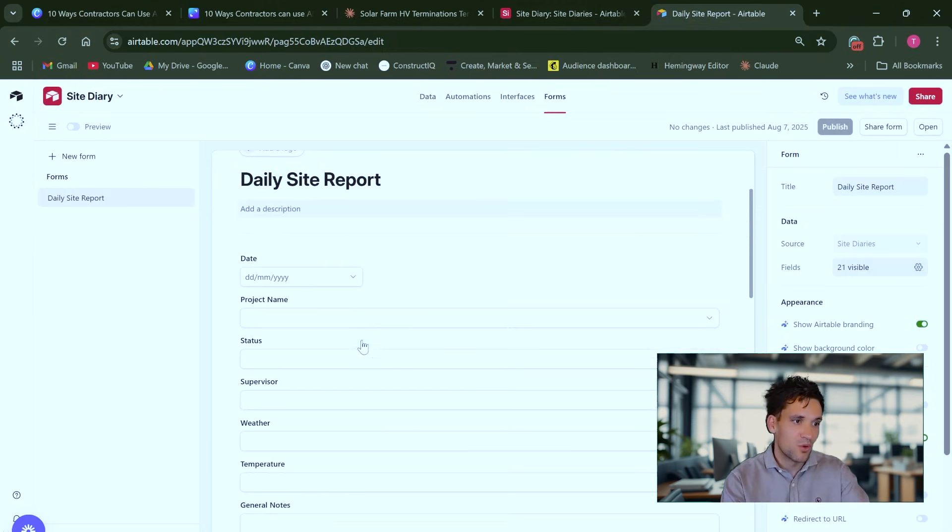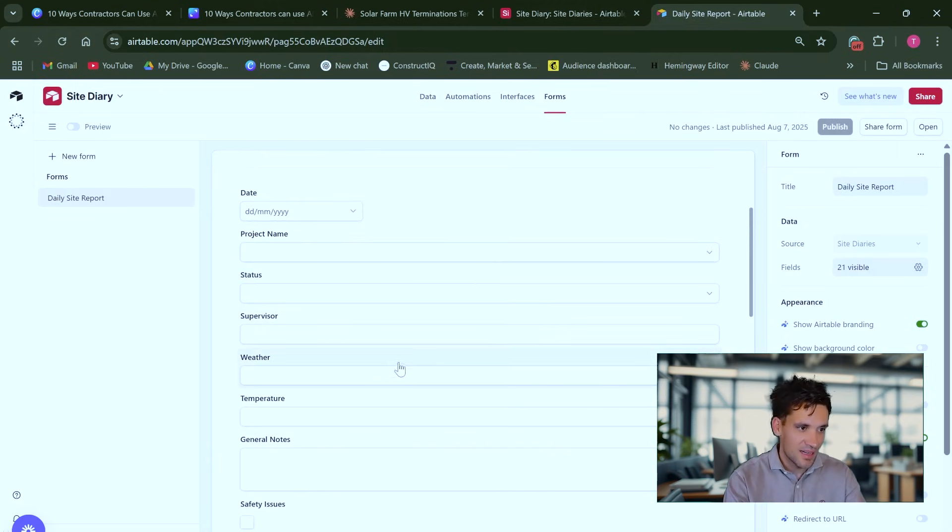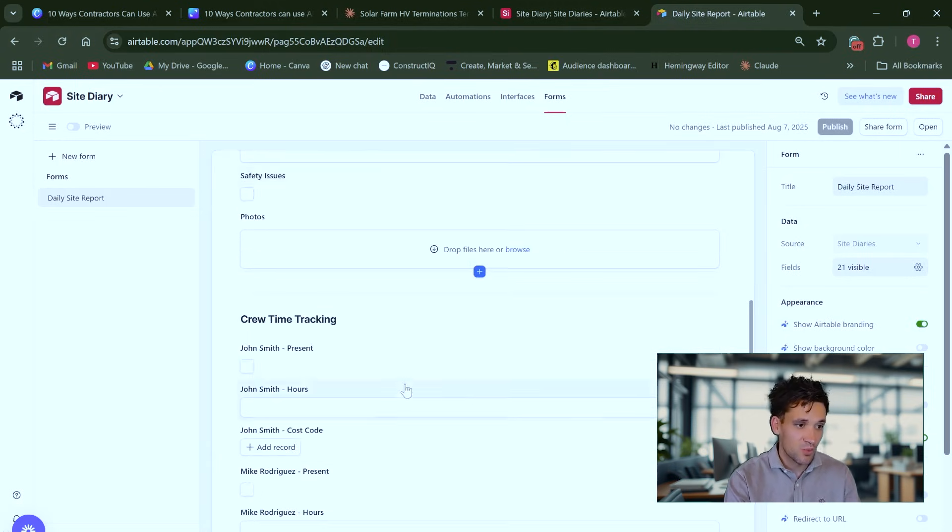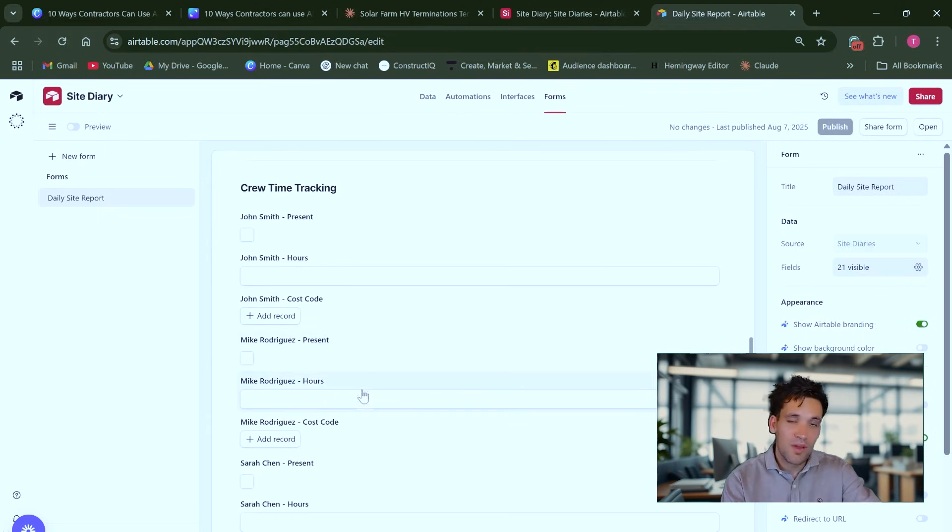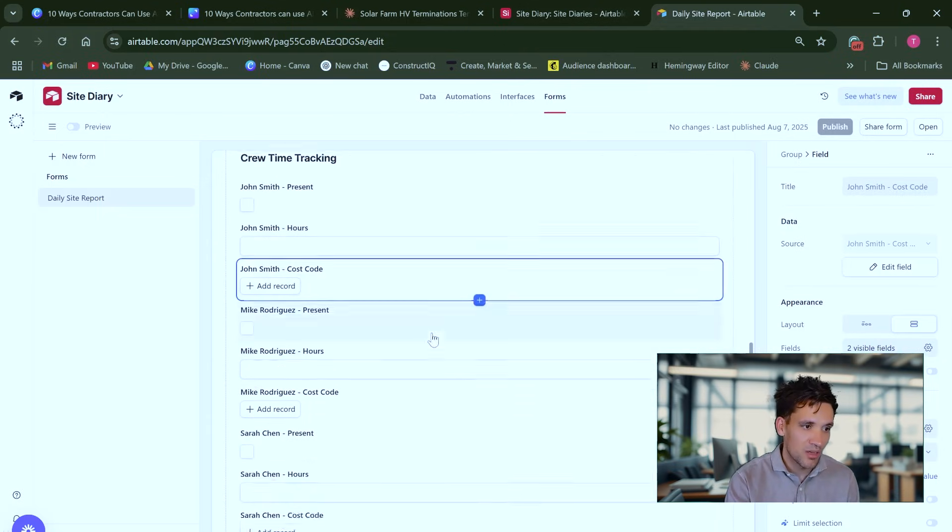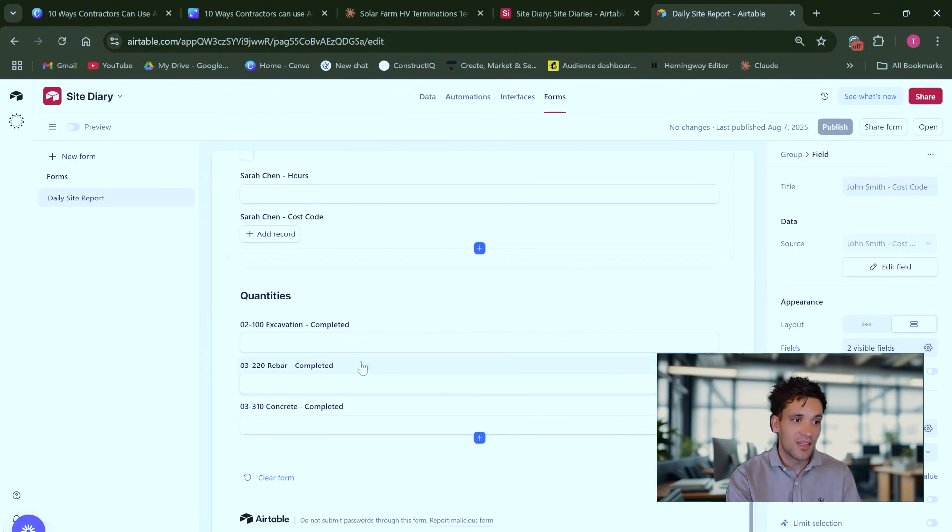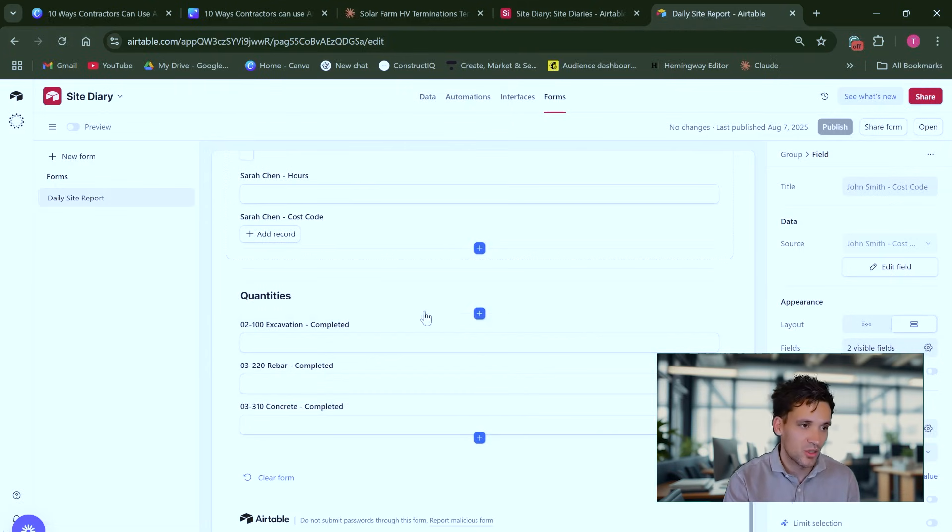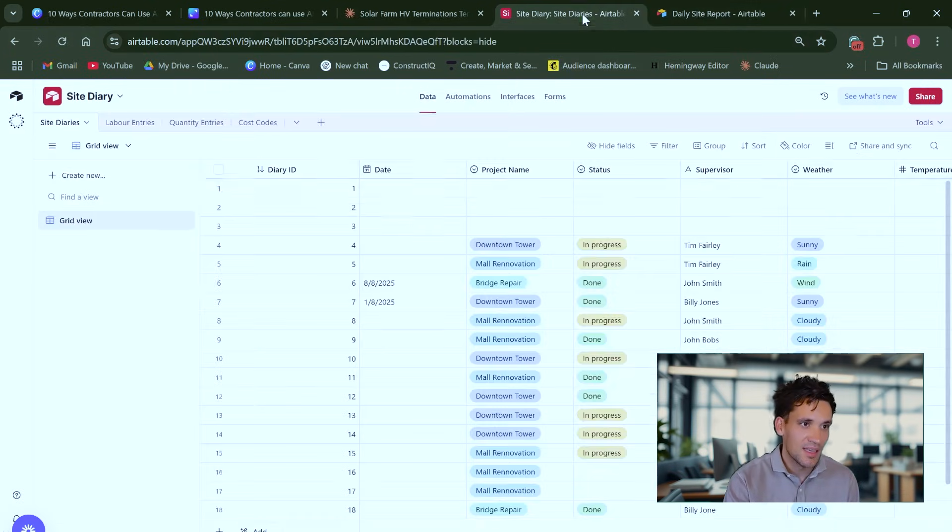So this is the site diary form. You enter the date, the status, supervisor, weather, who the different members of your crew are, what work they've done, what cost code they were working under, and then the quantity of work completed.